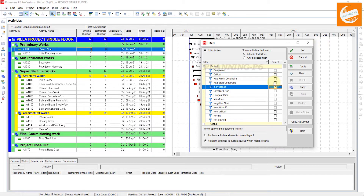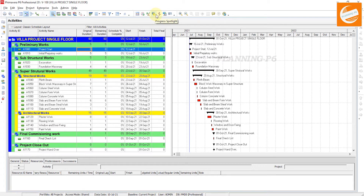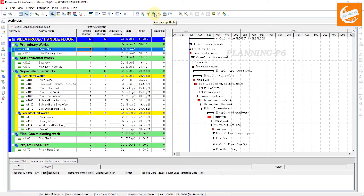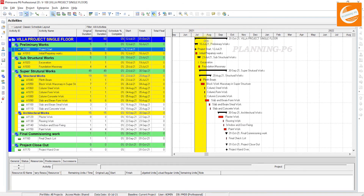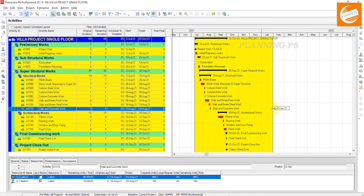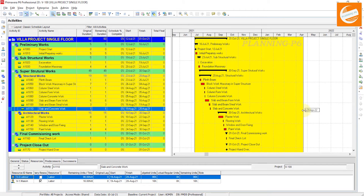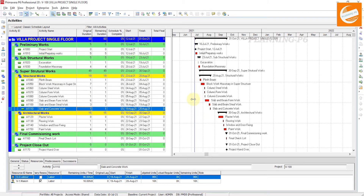The second method is to see activities with the Progress Spotlight. The Progress Spotlight is here — if you check on it, you can see a date range displayed. There is a difference between this and the previous filter: this is not based on your data date or updating date. If you check the Progress Spotlight, you can see it starts from a specific date. You can expand it and move the cursor to see highlighted activities across the timeline.